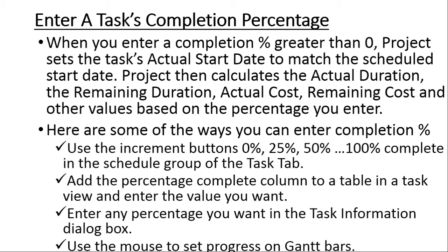So these column names, they are already there on the options. So all you do is just click a button that says add a column, then a long list comes, and this percentage complete is one of those options that you can pick. Then you have a column that actually says percentage complete. So in that case, right there on the Gantt chart view, you can type in manually 25% complete, 50% complete.